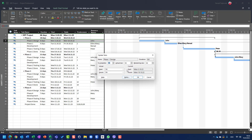What can I do here? If I put two days as actual duration — meaning how much work is done, how many days were spent — and put eight days as remaining duration, the total duration of six will be extended to ten days. Actual duration will be two days and remaining duration will be eight days.